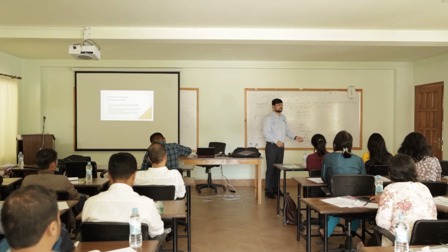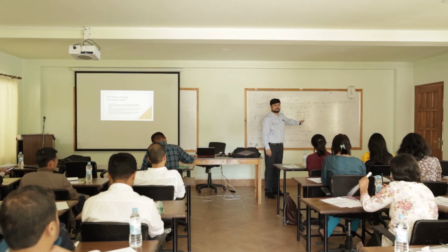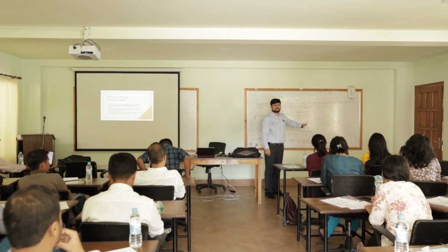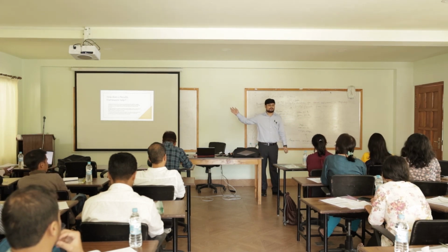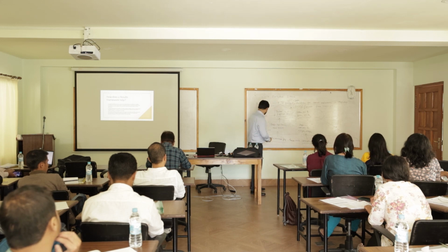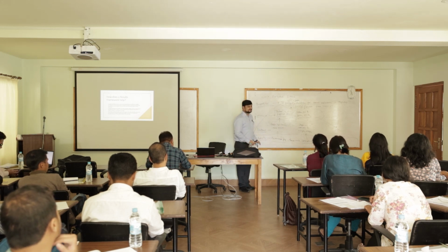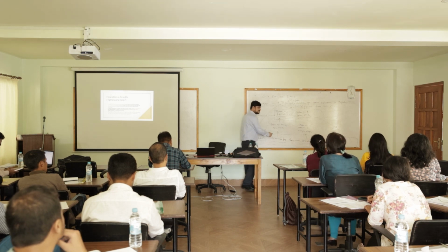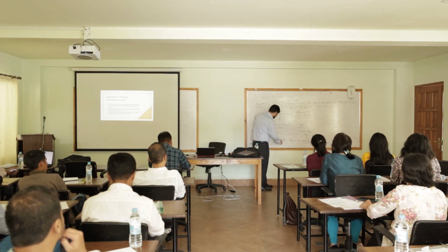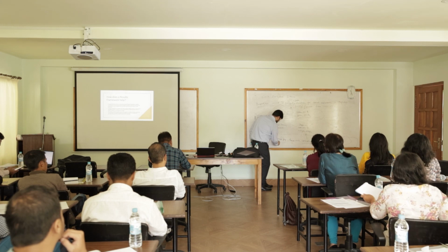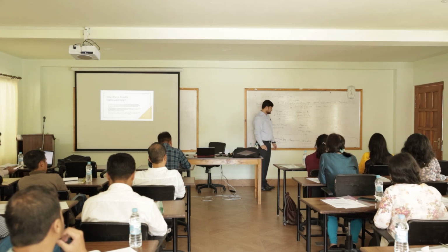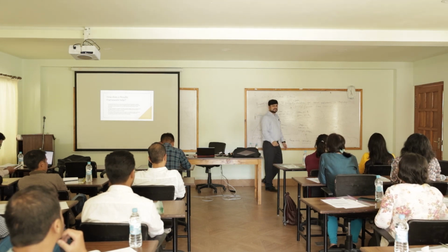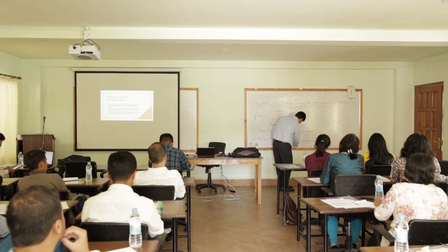Now just imagine you put this in the form of a table or a matrix, just like the one I showed you. On the left hand side, there will be all these activities mentioned with their targets. So for example, awareness campaigns, let's say 30 awareness campaigns have to be organized. For home visits, let's say 100 home visits have to be conducted.